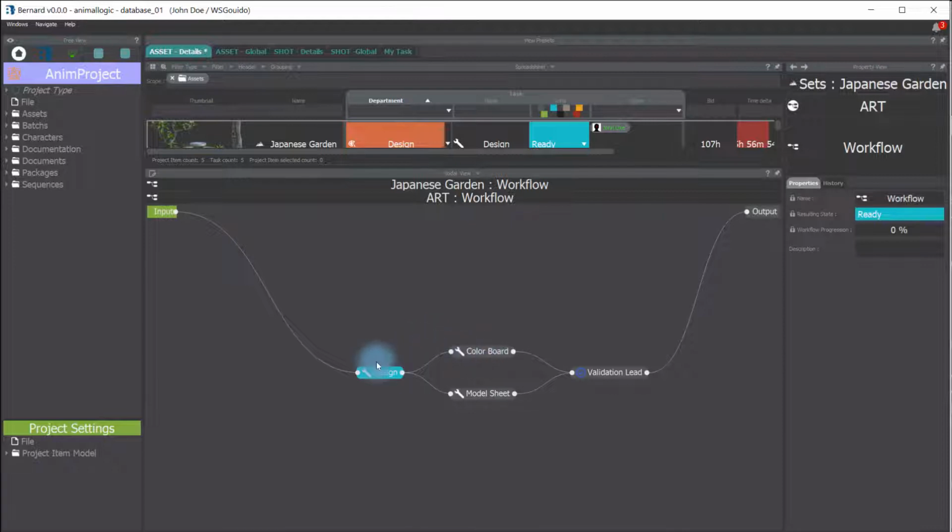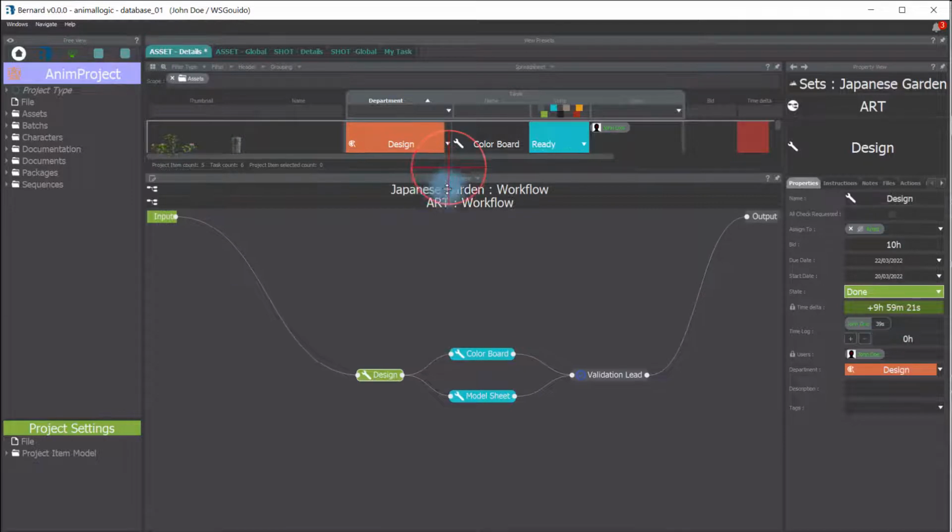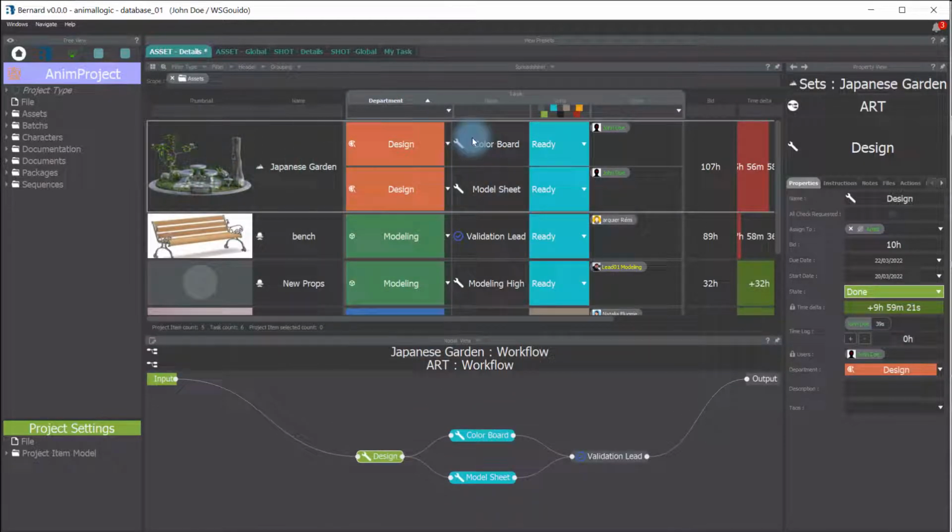One thing that is interesting in the workflow is that it changes automatically, meaning that when you finish a task, for instance this one, there you see different states. We've got 7 states. Let's say I make it WIP because I'm working on it, and then I change it to done. Then automatically the 2 other tasks will be directly ready to work. And here you can see in the spreadsheet that it changed automatically.